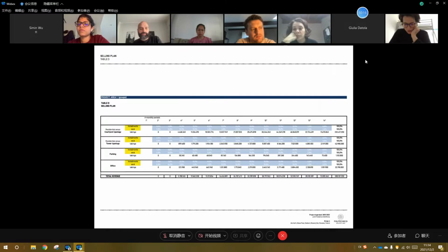Maybe you can start to take this distribution. If the project is unfeasible, you can change the distribution of the selling plan in order to have a positive net present value, or an acceptable internal rate of return. So then we come to the DCFA.